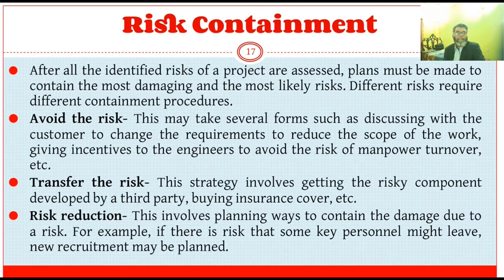Avoid the risk. This may take several forms, such as discussing with the customer to change the requirements to reduce the scope of the work, giving incentives to the engineers to avoid the risk of manpower turnover, etc. Transfer the risk. This strategy involves getting the risk component developed by a third party, buying insurance cover, etc. Risk reduction. This involves planning ways to contain the damage due to a risk. For example, if there is a risk that some key personnel might leave, new recruitment may be planned.